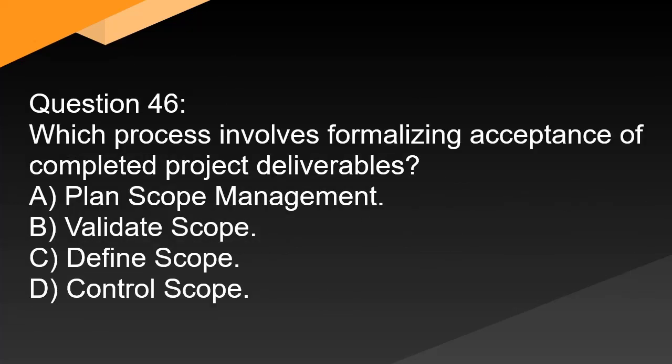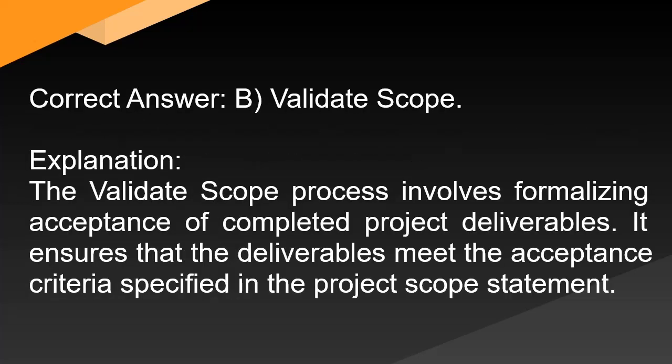Question 46: Which process involves formalizing acceptance of completed project deliverables? A. Plan scope management. B. Validate scope. C. Define scope. D. Control scope. Correct answer: B. Validate scope. Explanation: The validate scope process involves formalizing acceptance of completed project deliverables. It ensures that the deliverables meet the acceptance criteria specified in the project scope statement.